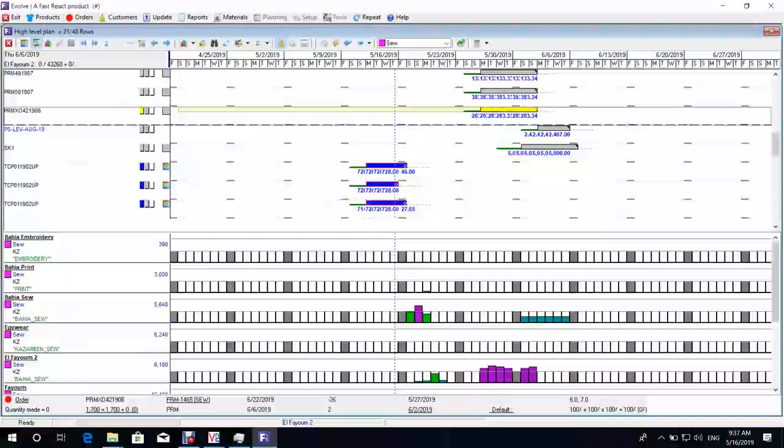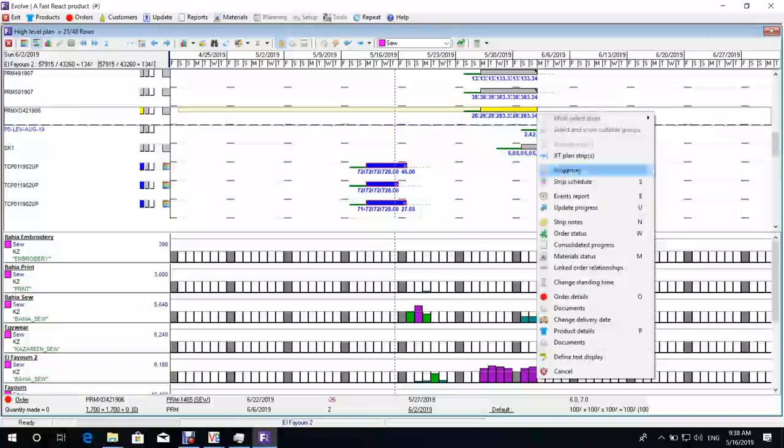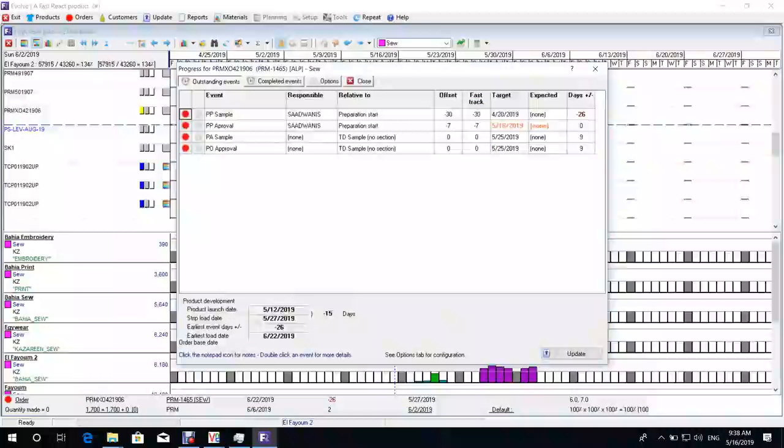This is the technical department, and the merchandiser will update us about those approvals. They wouldn't even need to. As long as they come into the system and update the activities, all you need to do is click on your order and then view the report. Go to event report and you can see whether it's been completed or not. You'll be able to see all the dates they needed to have achieved, and if they haven't achieved them, you can start asking, why haven't you done this? Where's this approval? Where's this sample? Who's doing what? So we must make it reflected in the ERP.